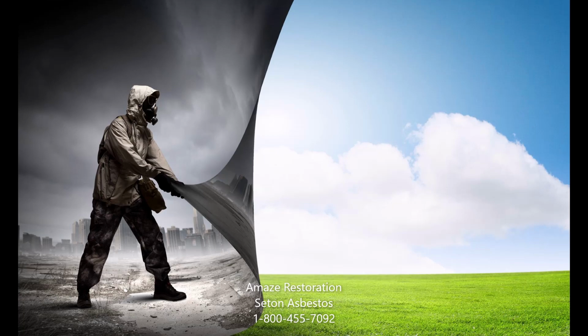Seton Asbestos Testing. Typically, there are two types of tests for asbestos: an air quality test and a materials test. The air quality test takes samples of the surrounding air and determines what amount of asbestos is in the air. A materials test is when an inspector carefully extracts a small sample of the materials in question and takes them to a government-approved testing facility for further analysis. Test results can typically take up to a week.